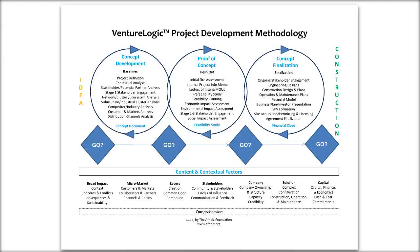What we're providing is a path so that, if your project has the potential to be bankable, you have a process, resources, tools, and a framework to help you get there. There are many variables including the actual feasibility, social, economic, technical, and environmental assessments. Funds are largely available at the end of that cycle — not before you've proven that the project is feasible, so there are very limited funds early on.